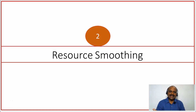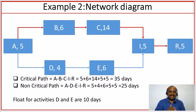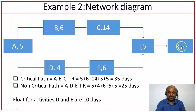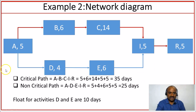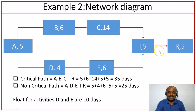Let us now understand what resource smoothing is. We have another example with a network diagram. We have two network paths: A, B, C, I, and R — with a duration of 35 days; and A, D, E, I, and R — with a duration of 25 days. The critical path is A, B, C, I, and R because that network path at 35 days is the longest. So the critical path is the longest path in the network diagram.